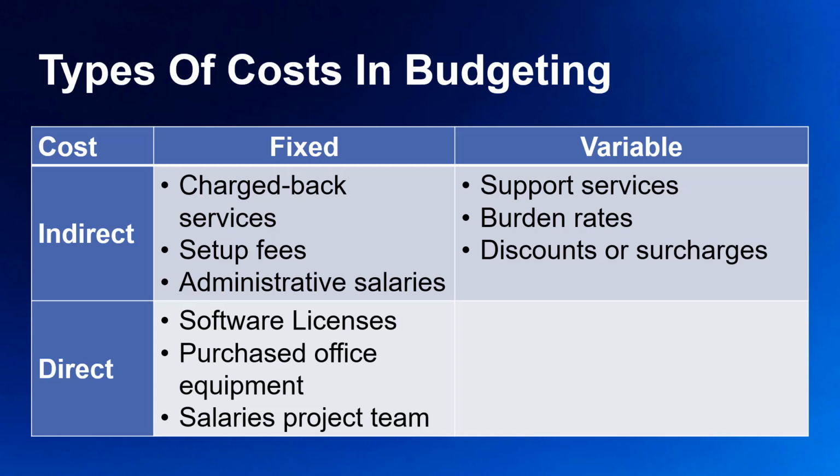Direct fixed is more common when you start a project. Direct means it directly applies to the project. An example is when you pay for an item once and it applies for the duration of the project. These are usually not items that go into the product, because if something is included in the product, the cost would change if you made more of that product. Desks, software licenses, hardware, manufacturing jigs, and tools are examples here. Direct costs usually only benefit one project.